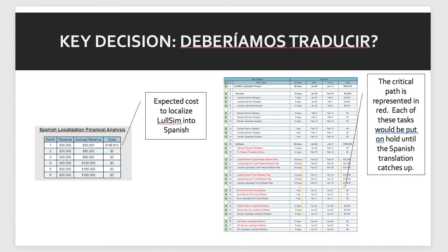More key decisions. The second decision presented is possibility of a scope change mid-project. The VP of Sales, Nicholas Prince, presented an opportunity to add a Spanish localization to the project to meet expanded sales in Spain. The local LawNet office in Madrid provided some sales projections that showed the potential cost of adding this language might be made up in as little as 5 months, which is quite good as far as cost return. With that said, the numbers don't fully represent the loss of revenue that may be caused if the German, French, and Japanese languages are delayed.